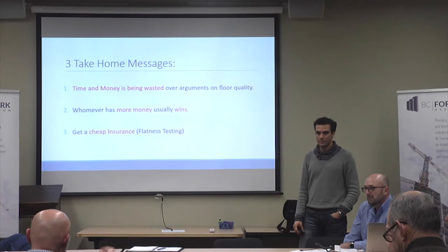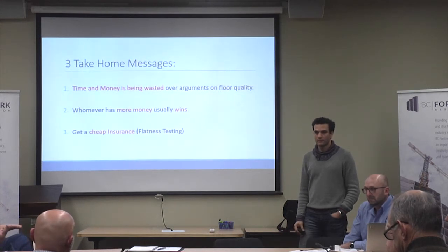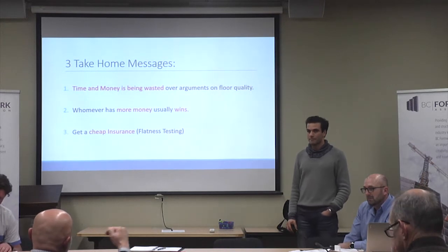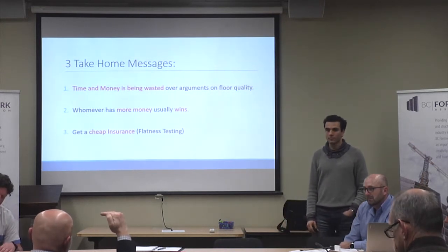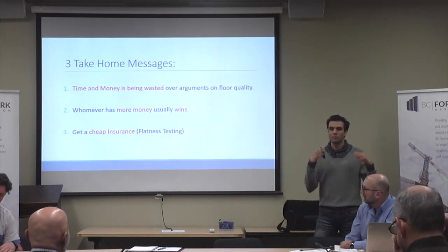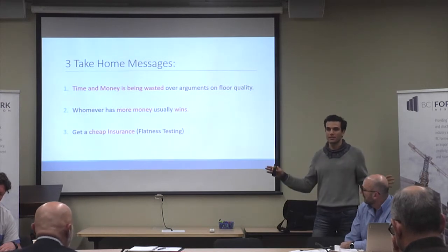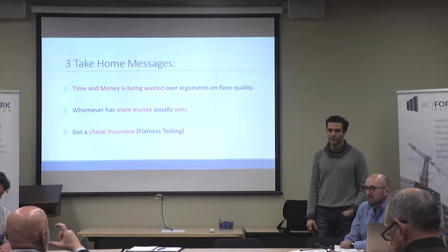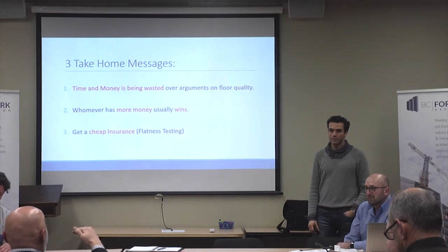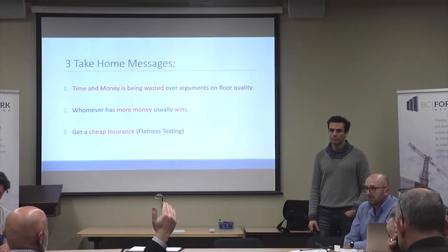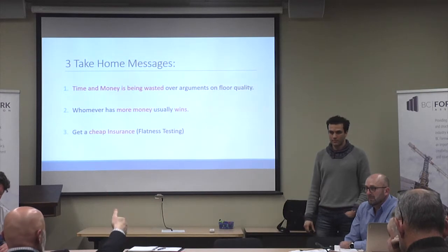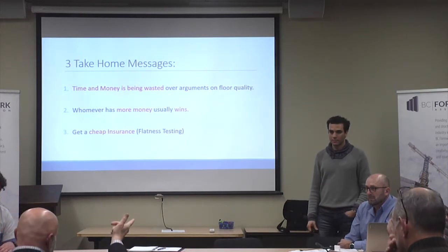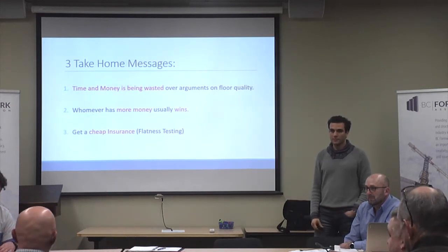So your initial readings at the beginning are going to be calibrated at that, right? What do you mean by calibrated? Well, you'll initially be testing for that in the early stages. Well, I don't care what I'm testing for, I'm just testing the slab. Right. My point is in the first 72 hours, you're going to be able to hit that tolerance and more. In 13 months, when the floor covering guy, the hardwood floor guy, gets onto the floor, it's not there. Exactly. So that's the clarity. That's what we want. Yeah, that's actually what I was saying.